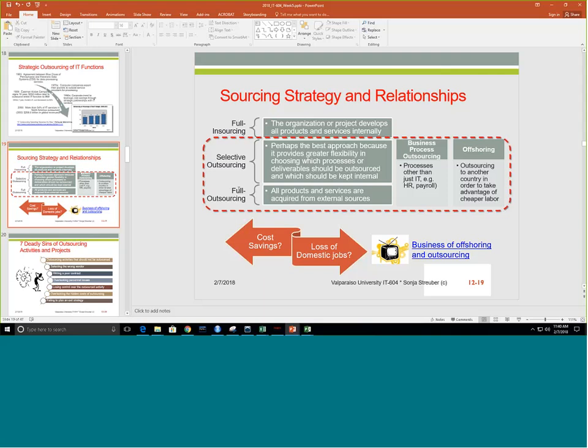This also means that when I am at work, I don't have the luxury of just calling my colleague in India to get an answer to a question. Most likely that person is asleep. And similarly, when that person has a question and tries to call me, most likely I'm asleep, since our days are really switched around 180 degrees. That kind of communication lag is only one example that can impact our schedule generation, and that we need to be extremely cognizant of.